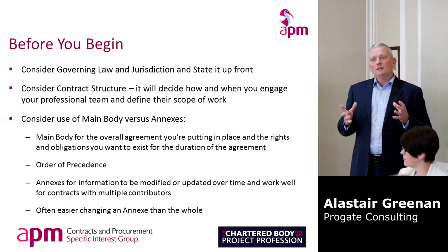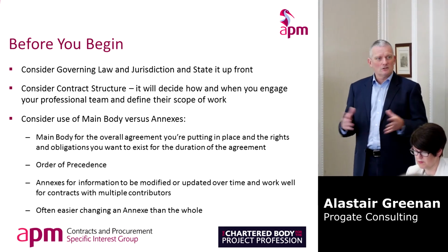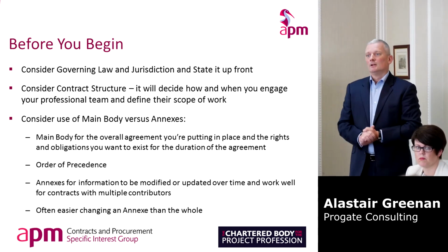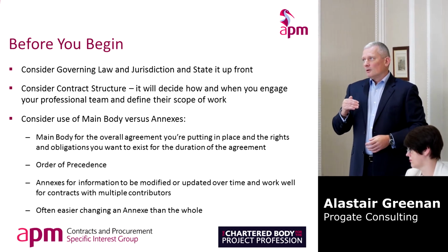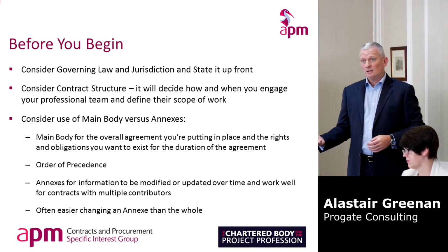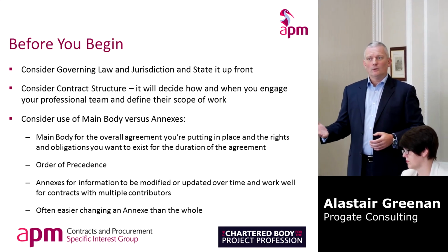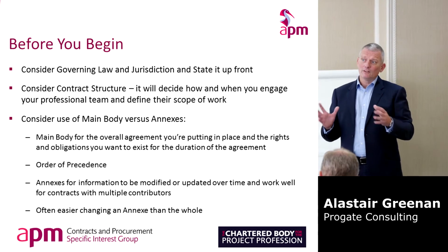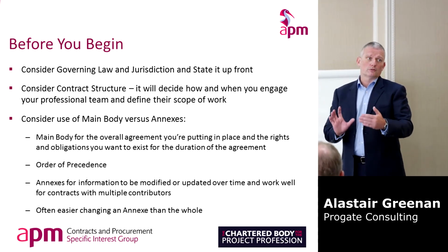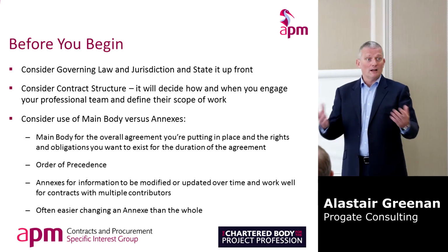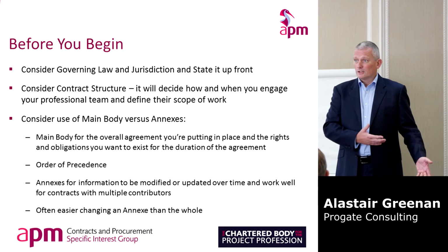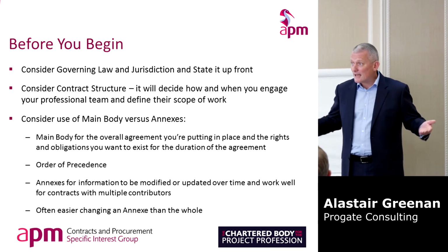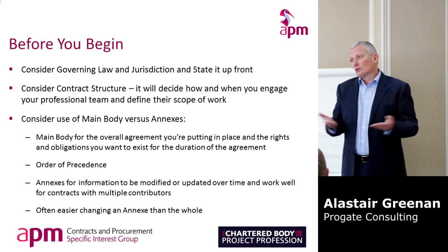Contract structure, as I said, think of it as a user manual, right? Not something that you're going to kitchen sink everything into, but something some poor person is actually going to have to be able to use. Yeah? So you want to think about what the project is that the contract is wrapping up in terms of how you structure it. So if, for example, what I'm doing at the moment, we have multiple construction and service contracts. Now ideally, that works well with a lot of common chunks to that contract. So for example, health and safety. You don't want one guy whose contract says he's got to wear boots and a hard hat, and another guy that doesn't. Because you're trying to manage that aspect on a completely consistent basis across all your contractors to keep everybody safe.